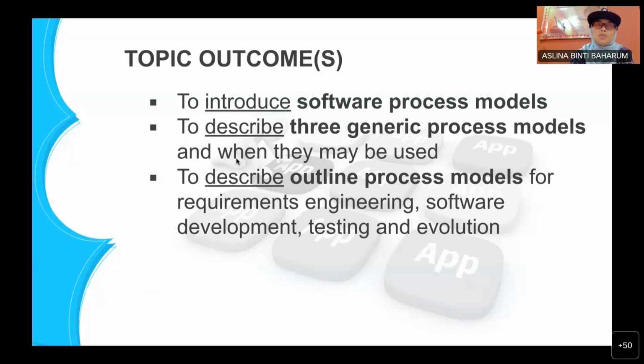We start with the user requirement, and then the implementation of the development, and we do testing before we can pass it to our client, or we can blast it, and the evaluation is the maintenance. Like I said, in real situations, evolution or maintenance is not part of the development process. It will take other terms and conditions where you need to open a new tender only for the maintenance, because the maintenance might take 3 to 4 years.